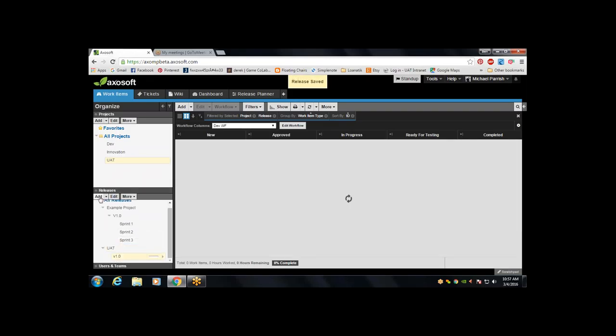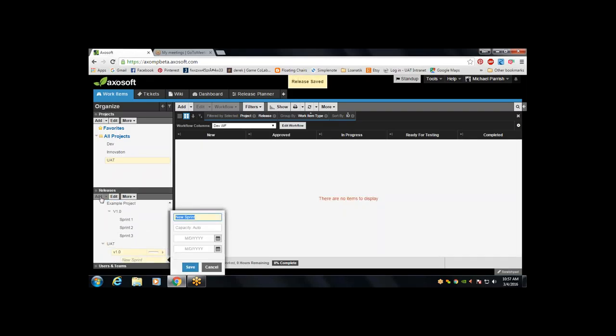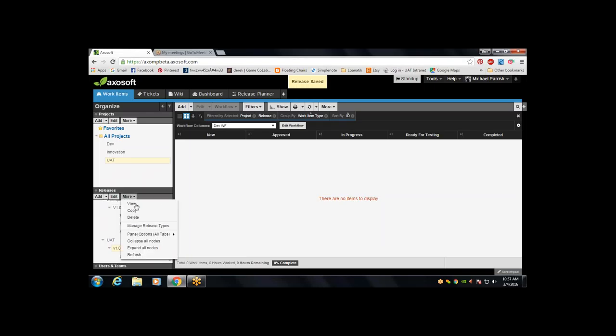Then, what are we working on right now? So this is our UAT Sprint 1. And this is something that we're focused on, we'll say, on the 4th. We're hoping to wrap this up on, say, the 25th. So you get to do it a little bit longer than a 2-week sprint. So this is the first step. Project, build out your release hierarchy. It needs those dates. And you can go in and show that data, show due date on tree. This is helpful. This helps me understand when I'm hoping to ship Sprint 1.